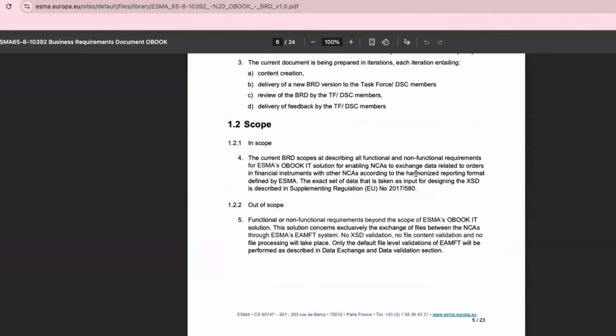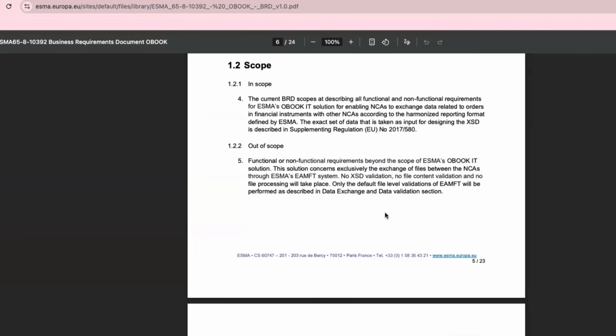Now, suddenly, business owners during UAT testing, or sometimes in the middle of development, or during SIT testing, are coming and telling you that this is a missed requirement. Why are you guys not focusing on this? We've already told you this change, but you have not documented it here. Then that is scope creep, right? So what you do is list all the change requests, then ask them to send an email. You also record the call, asking their permission, for the proof.